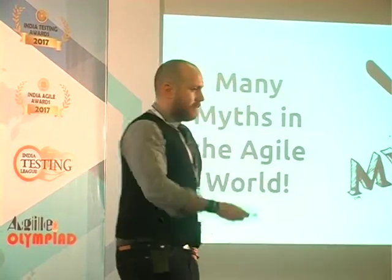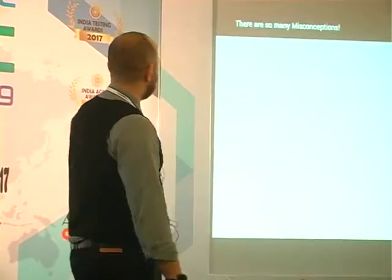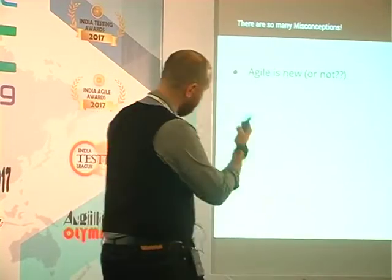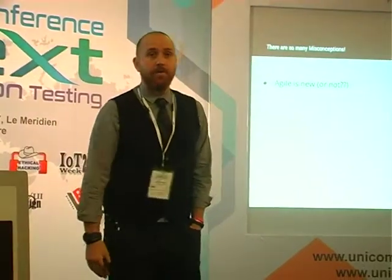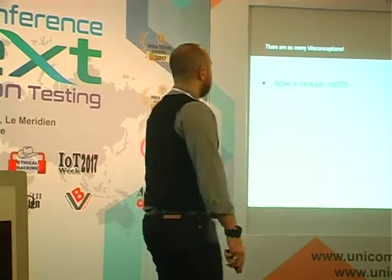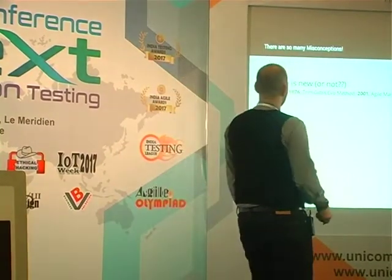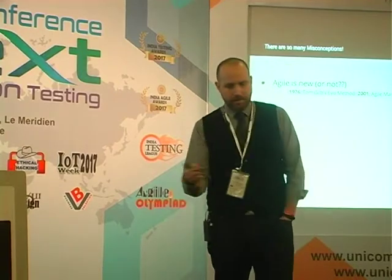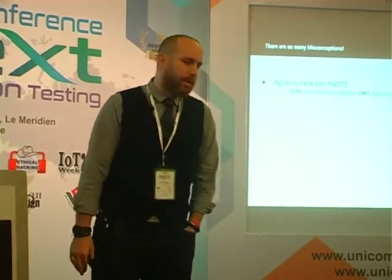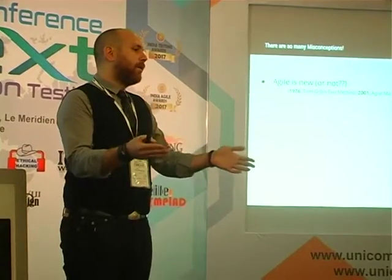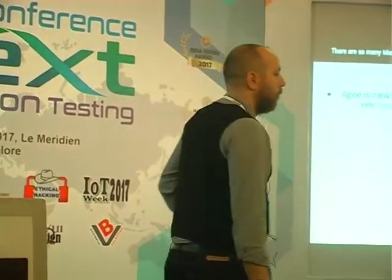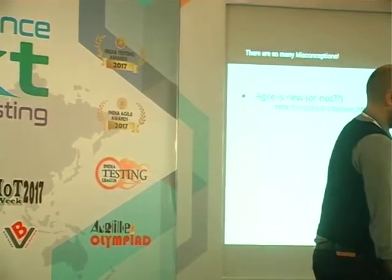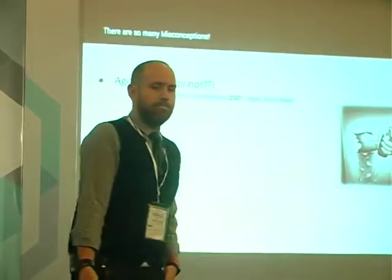There are so many myths in this area, so many misconceptions. The first one: agile is new. People look at it like it's rocket science, something very new. But it's not that new — it comes from Tom Gilb's evolutionary method from 1976. He says in the book that you need to divide and conquer: split the whole thing into smaller portions and develop them. The agile manifesto itself was developed in 2001.